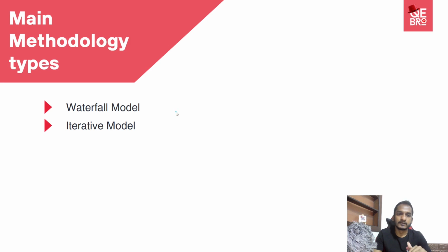Then when it goes to the iterative, it's not the same, one after another. We can start multiple steps together. With the requirement analysis, the designing will go on. Likewise, we can combine these steps, because it will take more time if you follow the waterfall one after another. You have to wait till the requirement analysis stage is fully completed, and till then, all the other developers and the testers will be idle. After the requirement analysis is done, then it will start the development. Likewise, it will go. So in this case, it will take a long time, and we need a big budget as well.